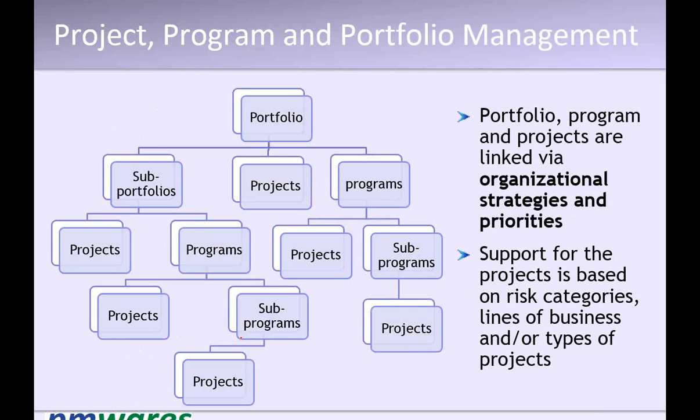Why? What is the benefit? Collectively managing these projects together will be more efficient than managing them separately, because there is something common in them. When 3 projects are there for the same client, you can bring them together, and you will find it is much easier to manage them together because you have better knowledge about the client.